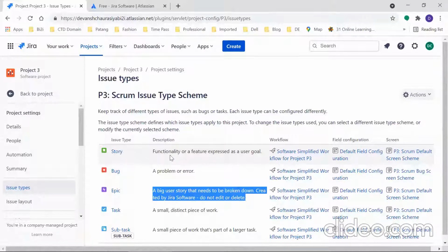Under back end, there'll be a backend database. There will be a backend UI for the admin, right? There will be different functionalities. These are the user stories you can create, and you can go granular in that. Then you have to create, let's say under front end there'll be a login story. Create a login. Within login there'll be a task. Login by email, login by Facebook, login by Google, right? Those are 3 subtasks.